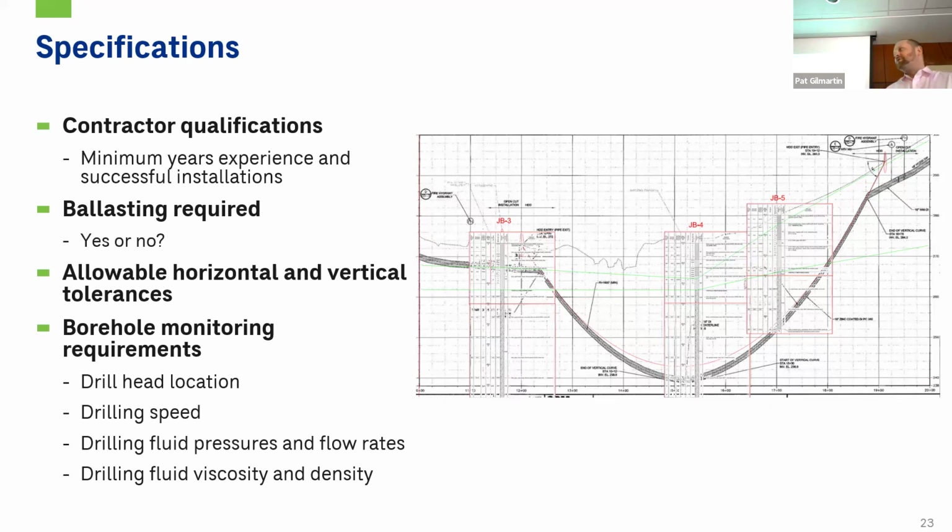And your regional contractors may say that they might be able to actually do that drill, but you can run into a lot of complications during construction. And so for those larger jobs, we really try to make sure that they have those, whether it's pre-qualifications or just minimum requirements in the specification.